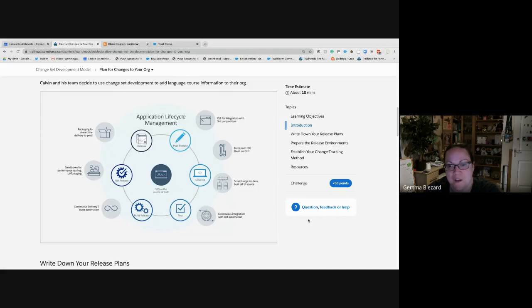But the idea is that you align your sandboxes and scratch orgs with your testing and building that you're doing as you go. So as you're working on your user stories, or as you're working through your spec, you're configuring your objects, you're building your flows, you're building your reports and dashboards, and then you're going to deploy to, you'll be doing that in your own local sandbox, but then you're going to be deploying to another sandbox, which is where you pull everything together and check that it's not breaking everything. So we typically call that a QA or integration sandbox. Sometimes it's called a SIT sandbox, which is a systems integration testing sandbox. And we align the sandbox strategies with our testing strategies. So ideally, if you're going to build something, you should be testing it yourself straight away.